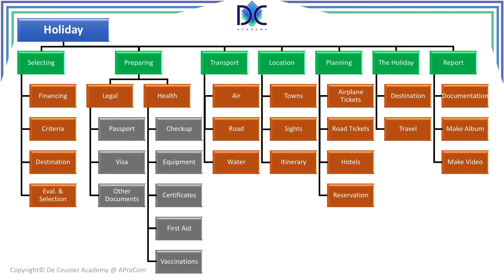Once you make this for one holiday, you can use it for all the others. If you travel a lot, you create knowledge and may have a checklist that works like a WBS. You can try making your WBS with the team to find out how you want to structure it. You can make a template, review it, and adjust it to specific needs and problems encountered. Once finished, we can move to the next step.